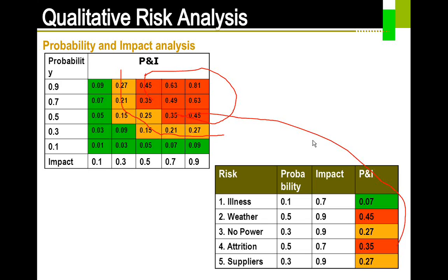However, the impact is going to be quite high in that scenario, right? If I say the probability of the building collapsing is 0.01, the impact is going to be very high, if at all it does, 0.9. If we multiply these two, I will still be somewhere here. So that is the reason we were all coming to the office and sitting in the building, and we were not much worried about all these things. So that's how it can be done and then analyzed.